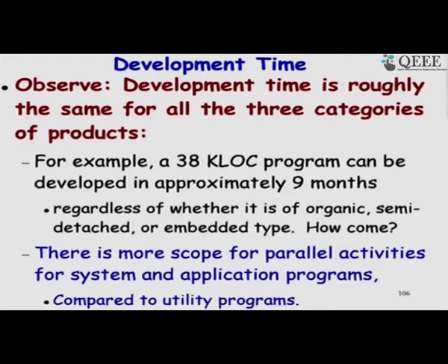But then the project managers kept on using the same estimation models throughout the development cycle. So, first they would estimate during requirements, get a very rough estimate, and as the development progresses use the same expressions, but then they have a better understanding of the software and they can get more accurate results as the development proceeds and change their plan accordingly.